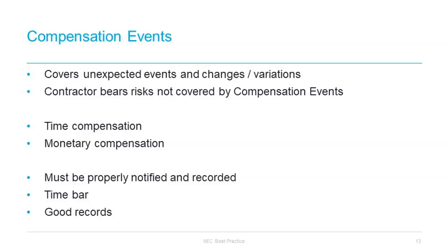The charges section for a compensation event is also a source of some confusion, as it is applied as a percentage uplift on the people rates according to a predetermined percentage set out in advance in the contractor's contract data. This uplift can cover lots of things, such as welfare facilities and surveying costs, but it is important that there is no double counting, as anything within that uplift cannot also be separately claimed within the equipment head of claim.